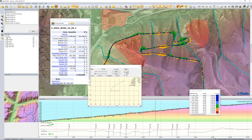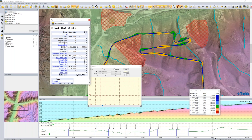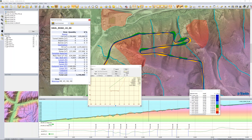If you need earthworks quantities, you can click back to Quantum and export all inputs as a report or CSV — quite a bit of detail available, done for each individual alignment. Scrolling to the next alignment, you can look at numbers, make adjustments, and then export and drop that into Business Center as well. Because it exports in LandXML format, you can bring that into any other package. If you want to make modifications within Business Center, you can re-export as LandXML, bring it back into Quantum, and get a detailed cost of those modifications.